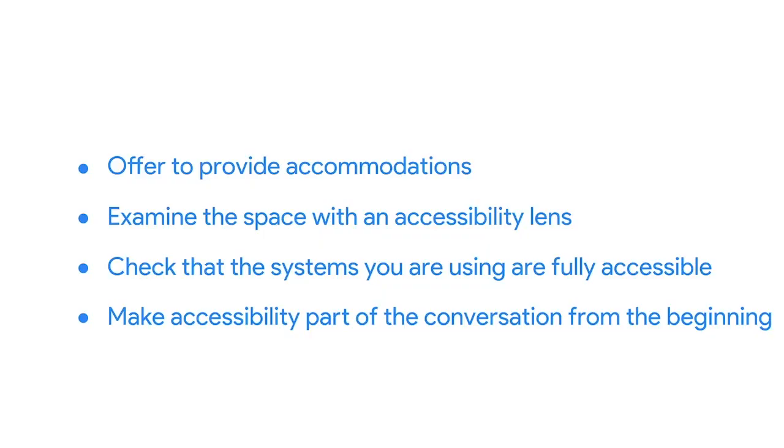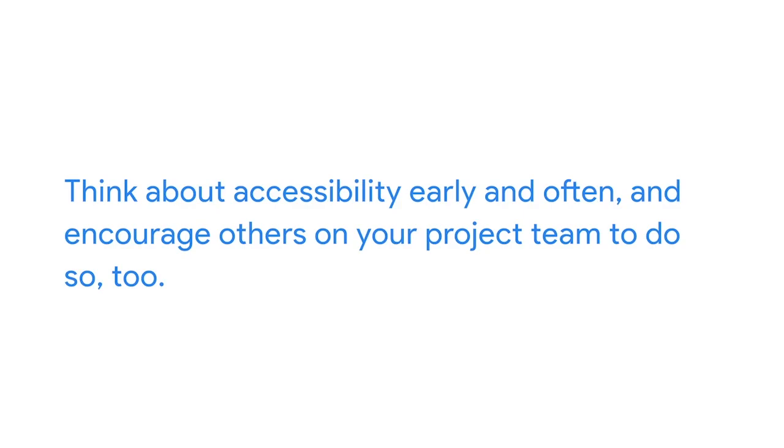Beyond collecting feedback, as a project manager it's important to make accessibility part of the conversation from the beginning, especially if your project pertains to a process or product. Oftentimes, incorporating accessible features into a product is overlooked or left to the final stages, and can lead to serious implications like launch delays or a product that can't be used by a percentage of the population. Ensure your developers are familiar with accessibility requirements at the start — help connect them with appropriate resources or experts, include testers with various disabilities in your usability testing whenever possible, and at the very least have the product tested for adherence to accessibility guidelines. Think about accessibility early and often, and encourage others on your project team to do so too.